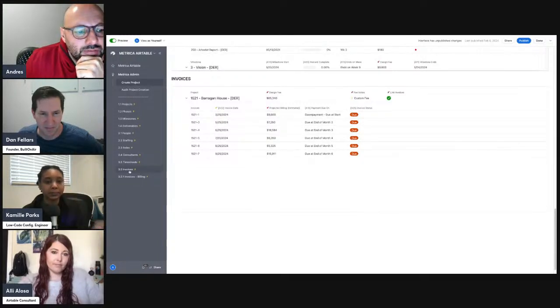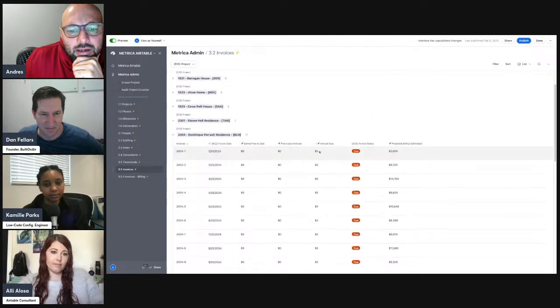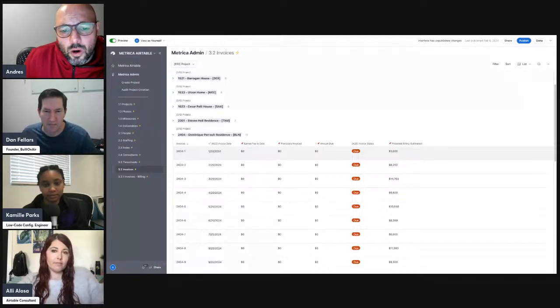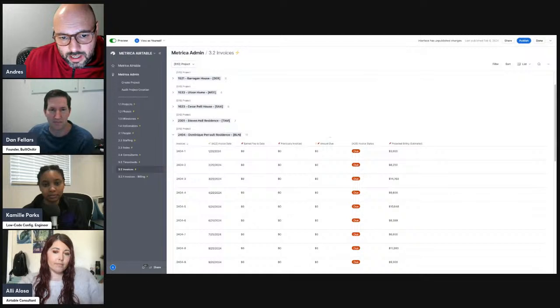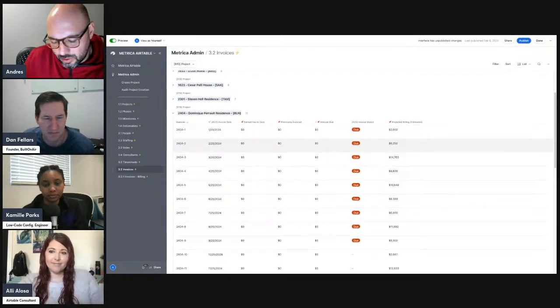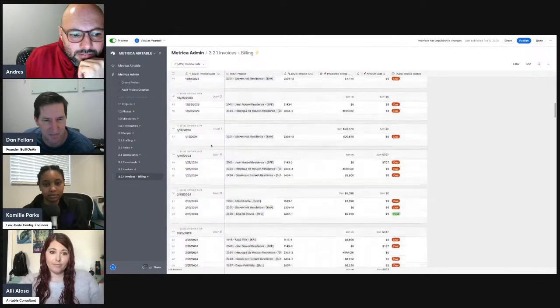When I go to the invoices and the billing, depending on the type of billing for the milestone, it's going to bill for percent complete, or bill for hourly and time spent, or be a custom invoice that I can do. So it allows me to track all this, and because I'm also keeping track of time, I can also determine what the performance of the project is. And this is how the financial works.